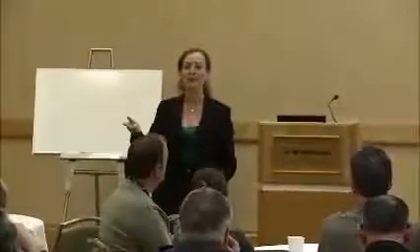Okay, so there's just a couple of things on that risk management process. So how do we actually walk through this? You establish the context, about 40% of your time. Then in your risk identification, there are different tools, methods and techniques that you can use to apply this process. So you know how we talk about the philosophy, the process and the practice? Well, for risk identification, you can use a whole string of techniques. There's probably 20 or 30 different methods that you can use, from brainstorming to workshopping to looking at past data, looking at scenario planning. There are some of the qualitative methods. You could look at a whole stack of quantitative methods, etc.